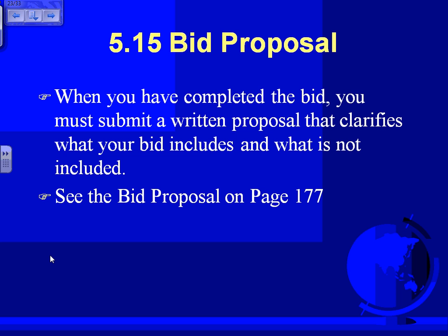Change orders. Look at that. If we have change orders, we are going to charge you $45 per hour for change orders. It says change for extras will be based on a labor rate of $45 per hour. And plus material, of course. Cool? All right, go to the second page, will you? Page 178. 178 has what's not included.